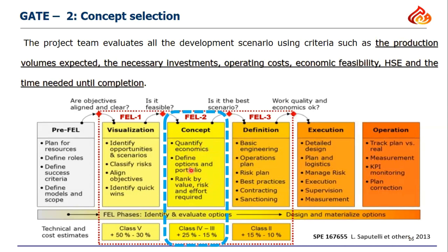But at least we have a production profile, and make the economic evaluation and a risk evaluation, because maybe the project is very economic, but it's very risky. Why? Because the margin between the price and the return from this project is very narrow. So this is a risky project. Or maybe the drilling is very critical and this is a risky project. Maybe the well costs me $10 million, or maybe there is some exaggeration and it will cost me $25 million, and so on. So I shall evaluate the economics of each option from the 6 options that passed the first stage, and evaluate the risk.